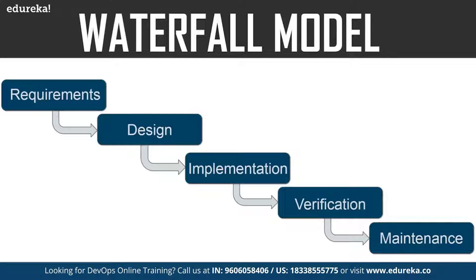So it looks like a perfect model, but it wasn't — it had a few drawbacks. One drawback is that unless you complete a particular stage, you cannot proceed to the next. This was a very time-consuming model, suitable only for projects where requirements are stable. In today's world, this is unlikely since requirements keep changing. No working software is delivered until the final stage, and this model was not suitable for large or object-oriented projects.